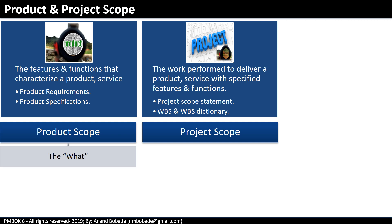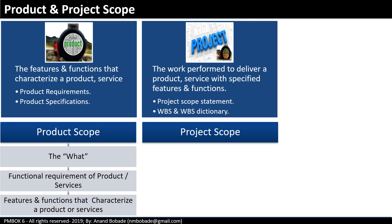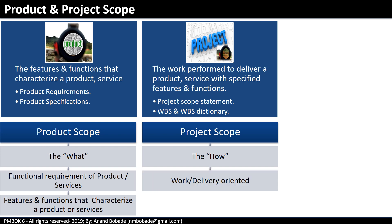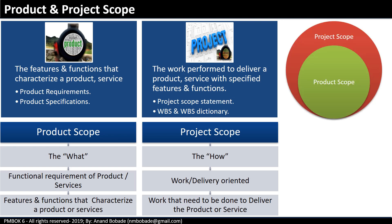Product scope addresses the question 'what' — what the customer wants. It refers to the functional requirements of a product or service, meaning the features and functions that characterize it. Project scope addresses the question 'how' — how the work will be delivered. It is delivery oriented and helps you as a PM to identify and document the activities or work that need to be done to deliver the product. Remember, product scope is a part of project scope.